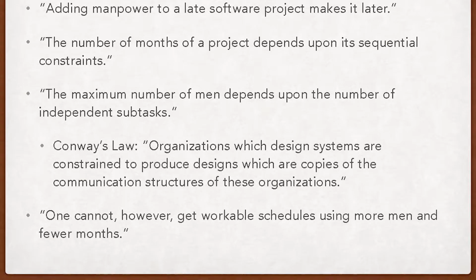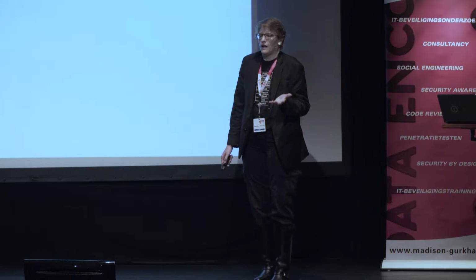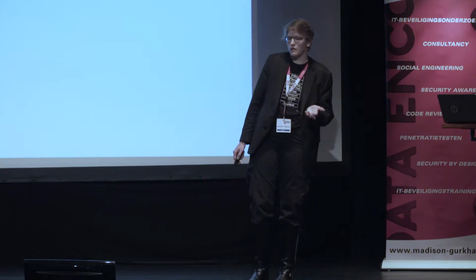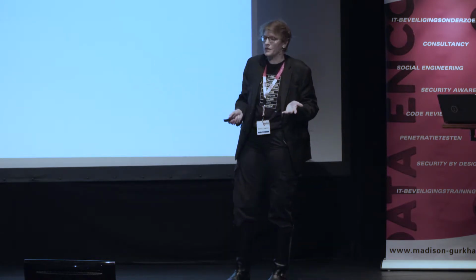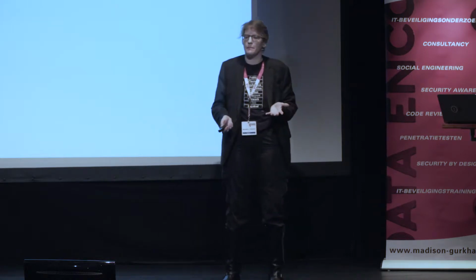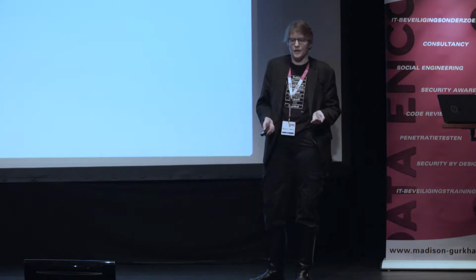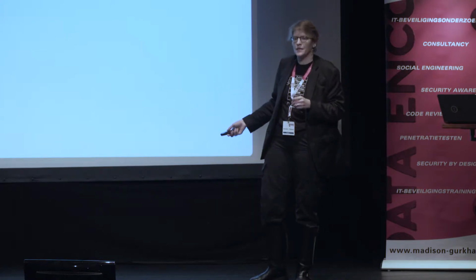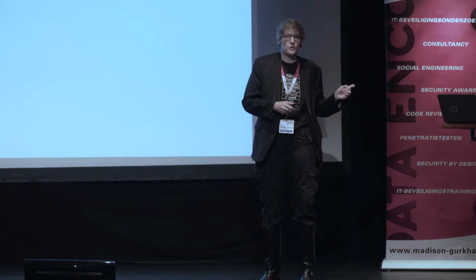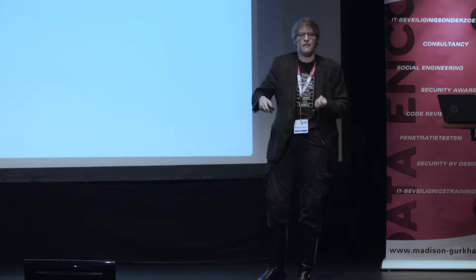You're already behind schedule. You want to throw more people at the problem to solve it, but all that happens is the deadline just keeps slipping and slipping and slipping. Now, Brooks' law is usually just constrained to that first sentence, but he goes on in the very same piece to talk about how you can figure out how long a project is going to take. It will take as long as it takes to do all of the pieces that are sequentially dependent. If you need to have A done in order to do B, and B done in order to do C, it will take as long as it takes to do A, then B, then C.